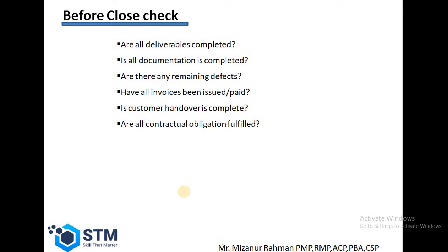But before the close, we have to check: are all deliverables completed? Are all the documents completed? That means the training manual or the installation manual is complete.